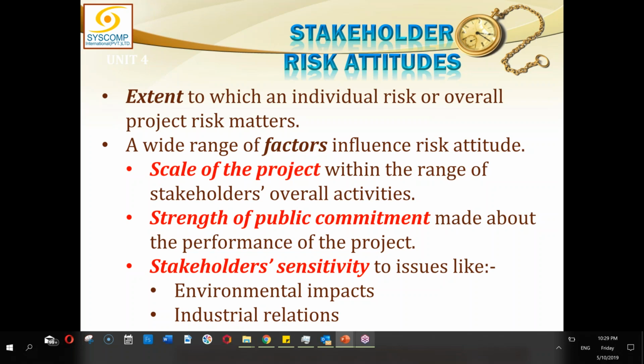Strength of public commitment made about the performance of a project. If you have made a commitment to the public that we will release this, or we will inaugurate this project on this date, whether that has any other importance or not, there is an importance of public commitment. So naturally, the tolerances or the attitudes of the stakeholders are set according to this.